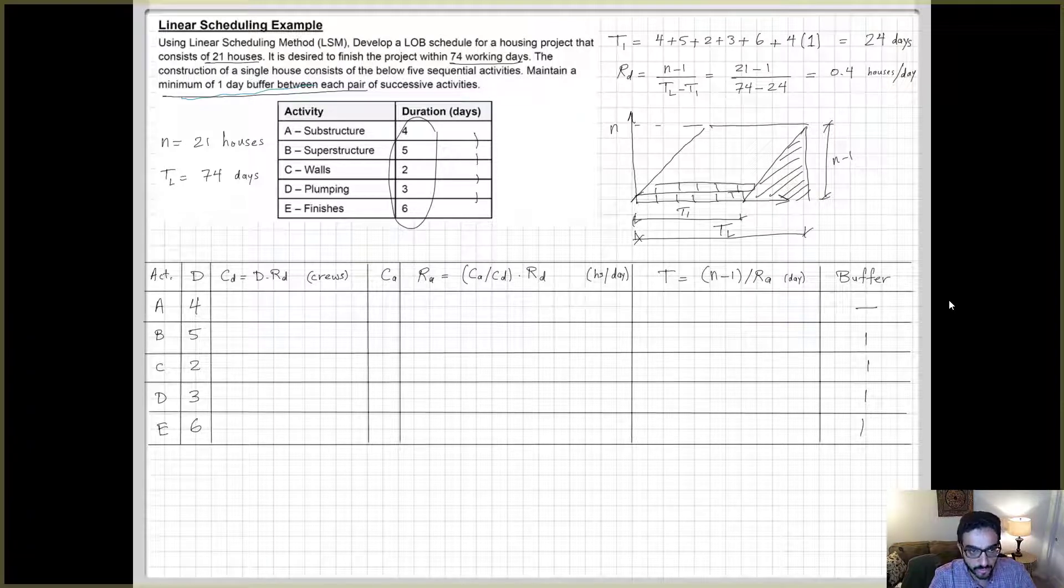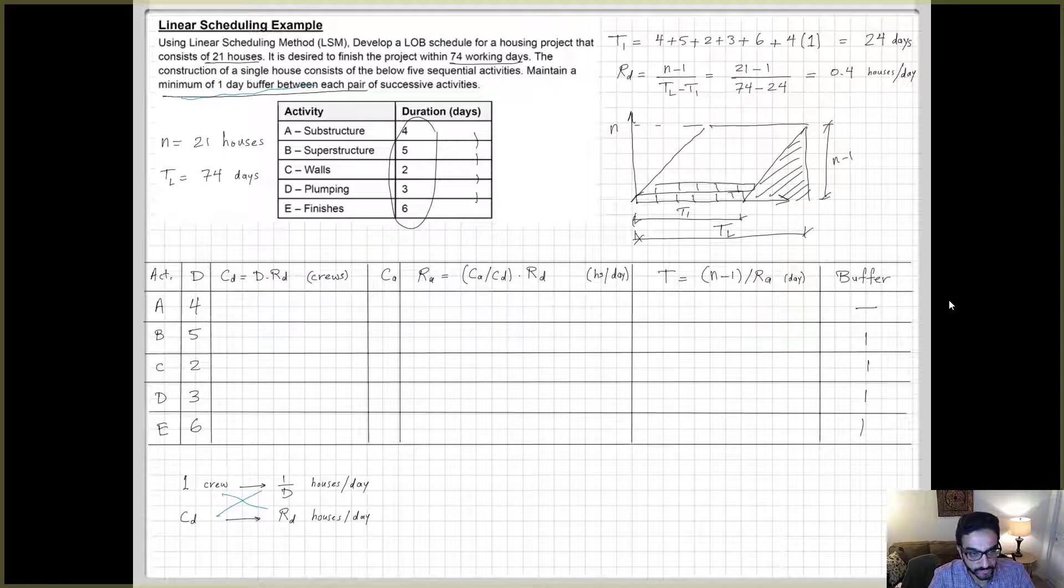Starting with the third column here, CD, which is the required number of crews that are needed to be able to achieve this overall required rate, RD. In the lecture I tried to explain how we came up with this CD value. For one crew, we will deliver one over D houses per day because if we use one crew, the activity duration will be four in the case of activity A. So thinking about how many CD, how many crews are needed to deliver RD, and considering the proportional relationship, CD will be equal to RD divided by one over D. So you will end up with RD times D.